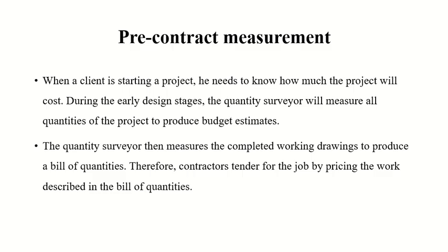so he can decide. And then on the basis of that, he will go for the final design, because the final design itself will take time and money. You tell him, just do the design for ground plus 2, and we will see. If you don't have enough money, we will only do ground plus 1. But in order to do the ground plus 2 design, he may have to spend 10,000 BD more for the consultant. Got my point? Clear now?